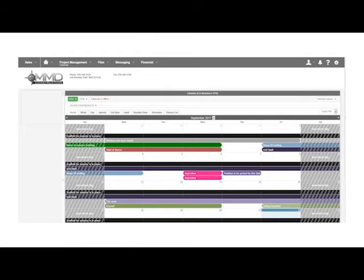And the way we're able to eliminate a good majority of the change orders is by doing our research in the beginning of the project. And that comes to opening up the walls and ceilings and doing a lot of research before we start the project. So once we're done with all this stuff, then we're able to put together a proper timeline and a proper budget on what it's going to cost to deliver you a successful project.